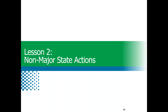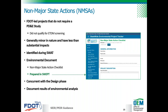In Lesson 2, we'll briefly discuss non-major state actions. Non-major state actions are those FDOT-led projects that don't qualify for the ETDM process and therefore do not require a PD&E study. Projects that proceed as non-major state actions are typically identified during the SWAP planning meeting. They're not expected to have substantial environmental impacts, but they require an environmental evaluation and completion of a non-major state action checklist prepared using the Statewide Environmental Project Tracker or SWEPT. If there are substantial impacts, then typically a SEER is prepared instead.